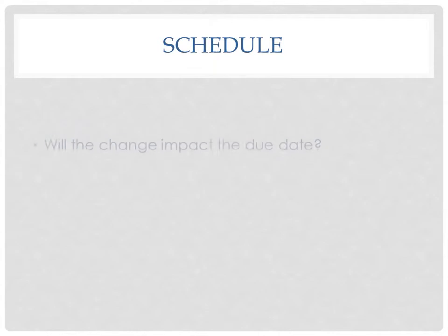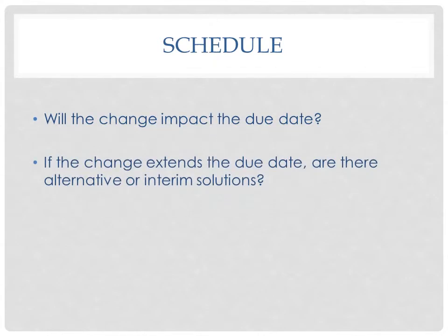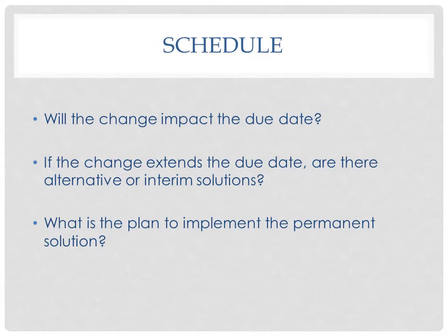If the requested change will extend the due date of the overall project, determine whether or not any temporary solutions are available to keep the original schedule intact. If so, include the plan to transition from the temporary solution to the permanent solution.